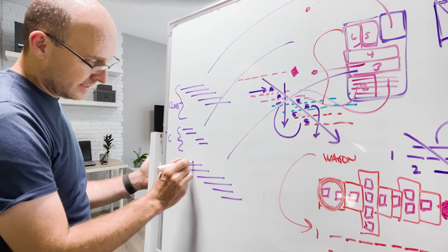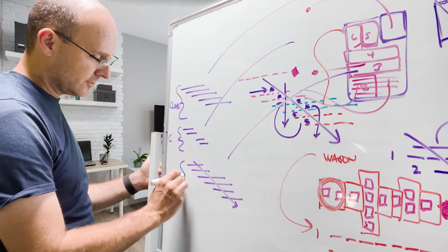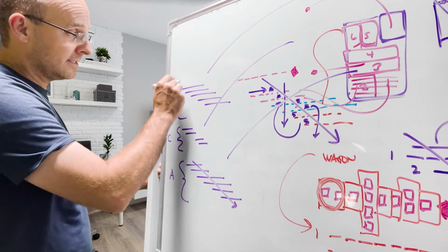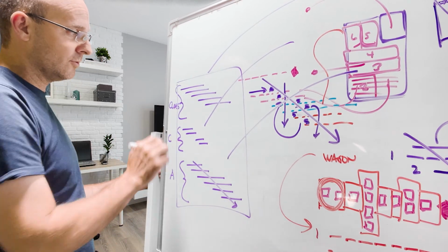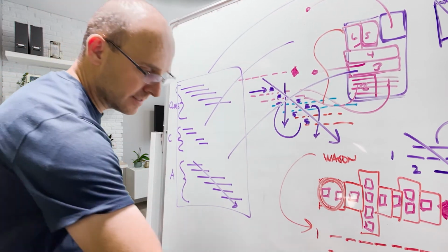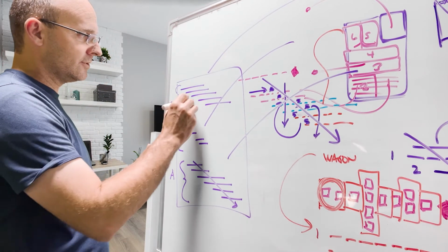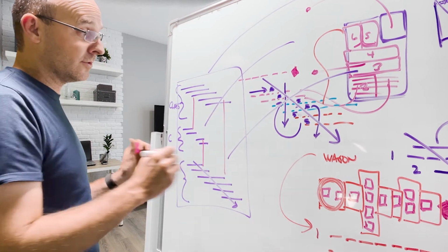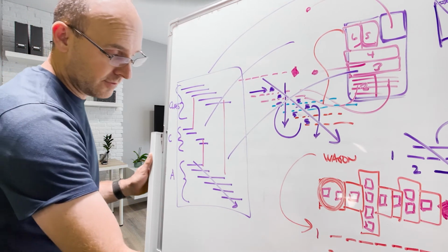But you've analyzed it for trade flow in here, and you show it on your takt plan, and this is for your auditorium. And this entire takt plan that you print out will show all of those phases together with the interdependency ties that make sure that all of the critical crossovers are accounted for in that takt plan.